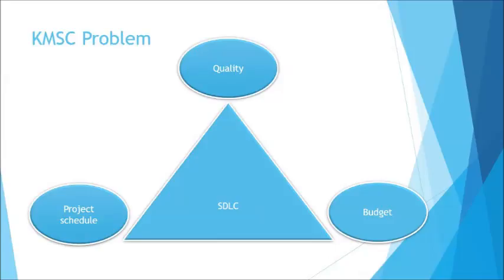If a change happens, the QA tester can create unnecessary test cases or miss the test coverage. Even worse, the developer creates something that the customers didn't ask for. This hiccup not only creates duplication of work, which can extend the project schedule, but also misses important coverage that can cause poor quality and cause the project to become over budget.